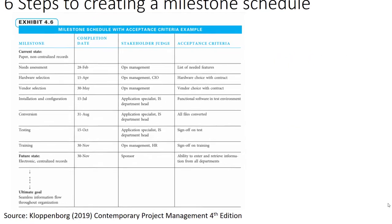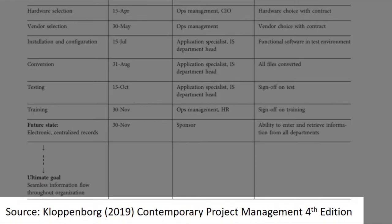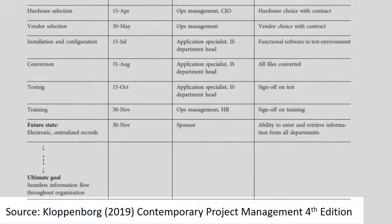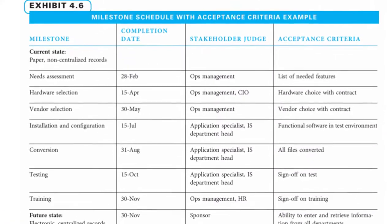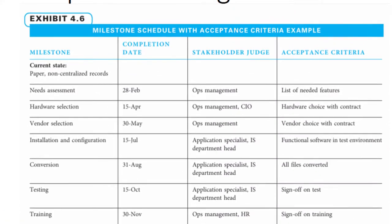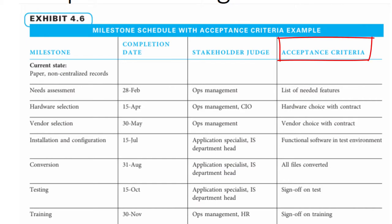In this instance, we will apply the method used in Kloppenborg's Contemporary Project Management textbook. The main headings are Milestone, Completion Date, Stakeholder Judge, and Acceptance Criteria.